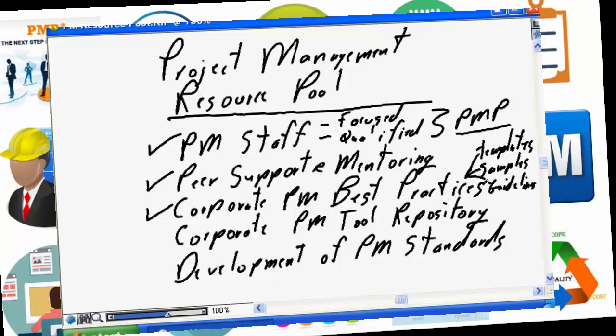Project managers focused on project management, PMPs, when they have downtime between projects, because they report into the PMO, their responsibilities during slack time is going to be development of your corporate project management best practices, development of templates, the fill in the blanks, take off the shelf and say, here is a sample project plan, here is a sample requirements document, here is a sample test plan. No longer do projects have to start from blank pieces of paper. Projects now have full, robust, proven best practices within which projects can be delivered.